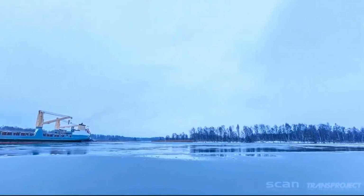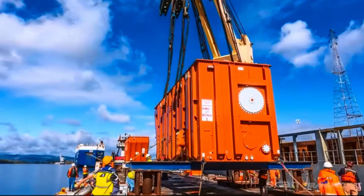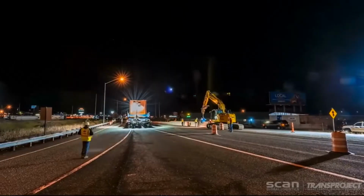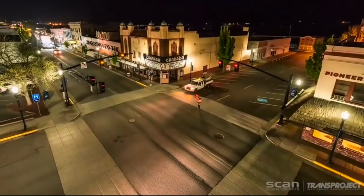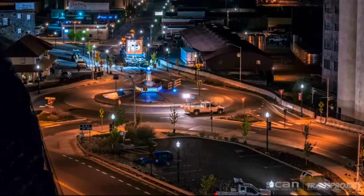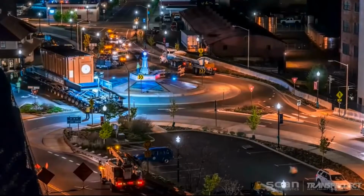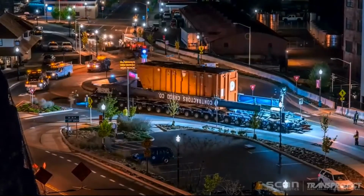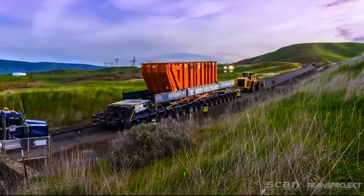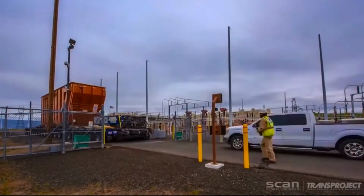The complex journey to move this 862,000-pound transformer began by ship from Sweden to Portland, Oregon, before being unloaded onto a Contractors Cargo Company barge. In Dalles, Oregon, a Kama K25 self-propelled trailer with no truck moved the load at 3 to 5 miles per hour. CCC's 5-man crew walked the trailer along while directing the lifting of overhead wires, road closures, and the removal of traffic signals. The project spanned several days to transport the haul only 6.5 miles, testing the year-long preparation that enabled Contractors Cargo to successfully deliver the massive freight to Dalles, Oregon converter station.